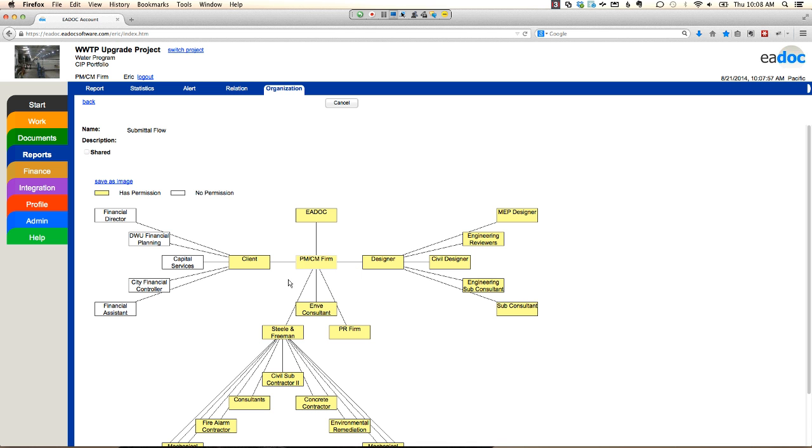So when you look at a submittal in our system, it's going to track when the subcontractor creates it, when the general received it, when they send it to my team here, when I passed it off to the designers, when they send it to their subs. It's all being logged automatically. This way for me as a PM/CM and for my client, we're not wasting money on these project participants. We're not paying for their administrators to maintain transmittals and maintain document logs. It's all being done by the software application.